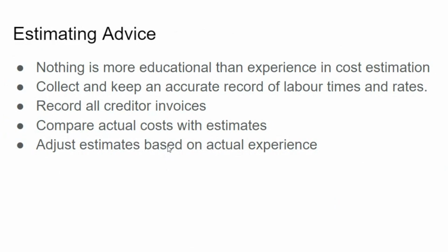And then finally, you're going to really say, okay, look, I estimated this project would cost me $800 to do. It actually cost me $900 to do. You got to learn from that and say, okay, next time I need to change what? And that's where adjusting the estimates based on your actual experience comes in. So learn from each estimating experience. What can you do better, different next time in order to improve the process? So it is very much an iterative process.